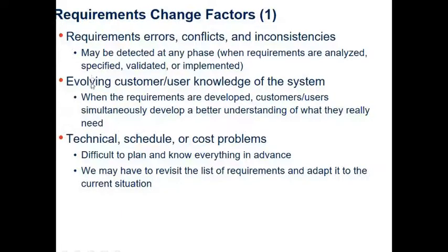Another factor would be evolving customer or user knowledge of the system. So when the requirements are developed, customers or users simultaneously develop a better understanding of what they really need, right? So when they realize they need something different and not what was actually done, that leads to a change in the requirements.